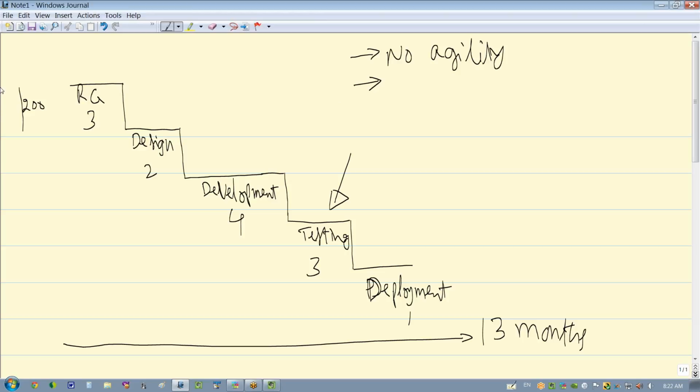Two. So you gathered 200 requirements, right? So you deliver those 200 requirements. It doesn't matter whether you take 13 months or 16 months or 20 months. Your goal is to deliver these 200 requirements. And you will not deploy your product even if you are not done with a single requirement here. You took these 200 requirements as your goal, and your goal is to deliver all those 200 requirements to production in one go. So there's no in between, either done or not done. Either 200 done or 200 not done. There's no in between.